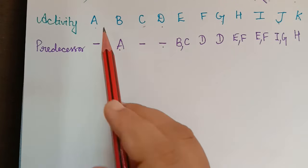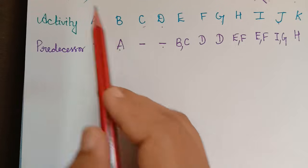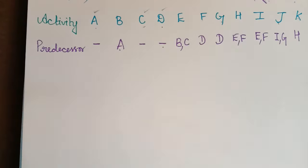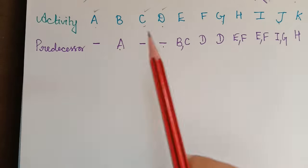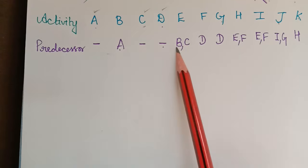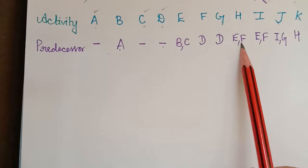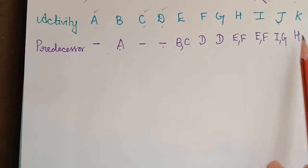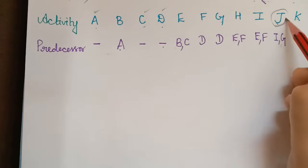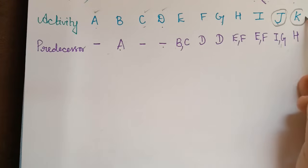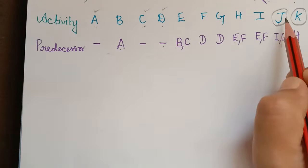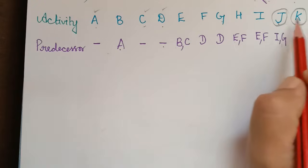The initial activities are A, C, and D. For the end activities, we check the predecessor list — A, B, C, D, E, F, G, H, and I all appear, but J and K do not. So J and K will be the end activities, as they have no successors.